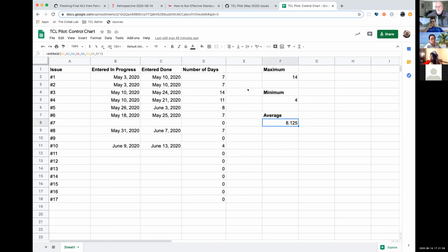It'd be kind of cool to see if we could get our average down maybe under 7 days for the rest of the project, right? We have several things left to do, and part of that would be to right size what's left so that we know we can hit it comfortably within a week. So we might actually be creating more individual issues, but each one of them is a little more bite-sized, right?